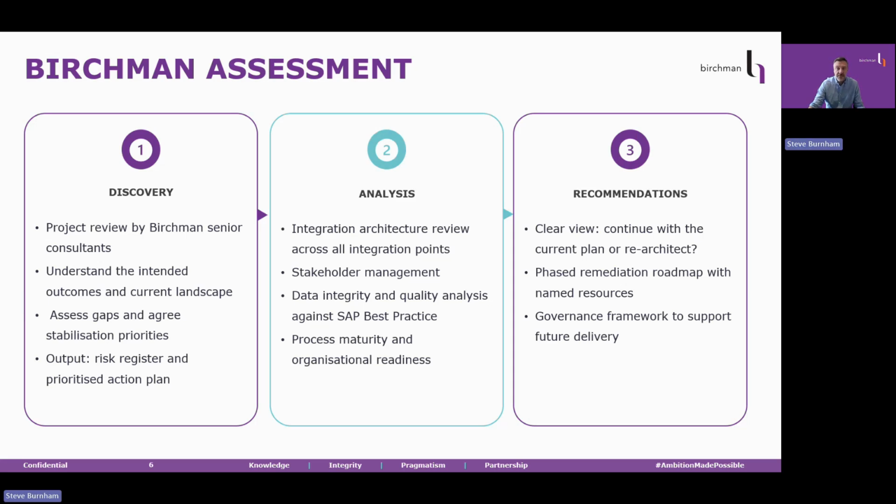Data integrity converts "the data is a mess" into a quantified defect catalog with a remediation effort. And process maturity and organizational readiness convert "the business is not using the system" into a gap map with named interventions. Stakeholder management converts "nobody trusts the program" into a clear picture of where confidence needs to be rebuilt and how.